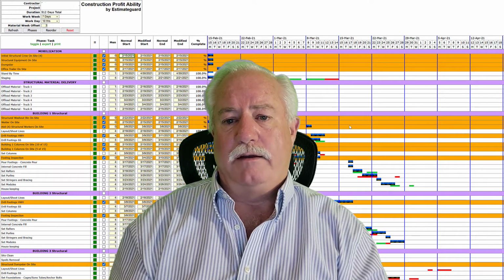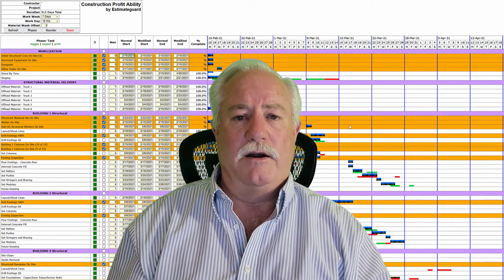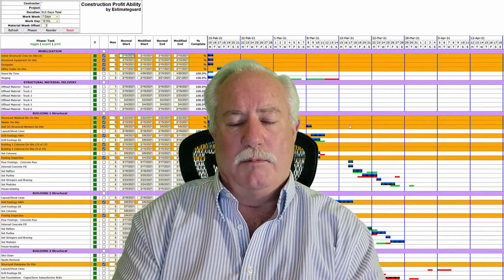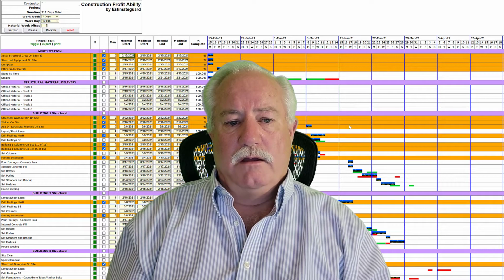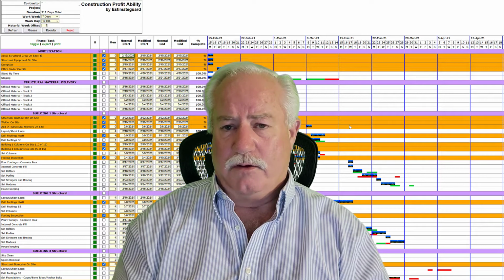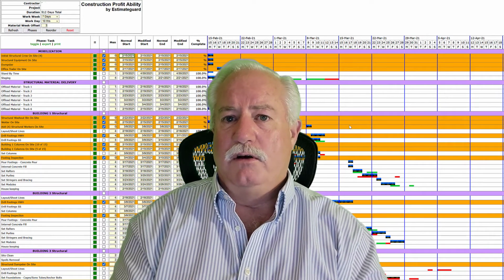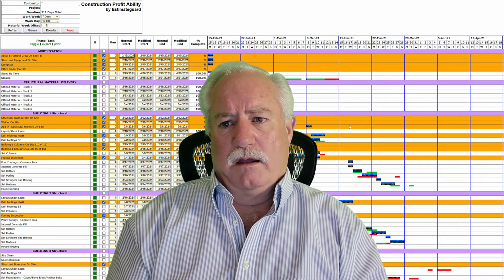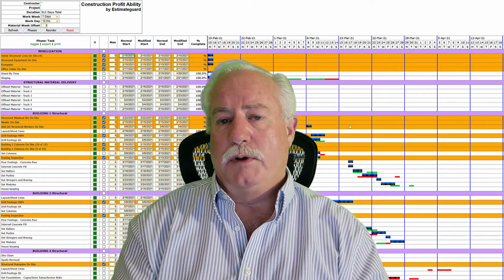And a lot of that involves, basically what you're doing is value engineering those drawings. You're coming up with a way to build it from a labor and material cost standpoint, okay? And so once that process is complete and everybody's happy, then you can put that material list out for quote with your suppliers. And you may end up using several suppliers.